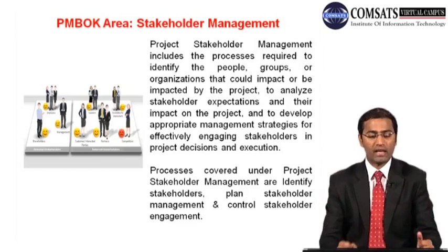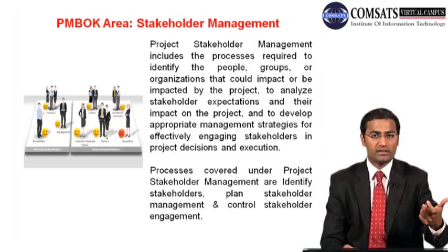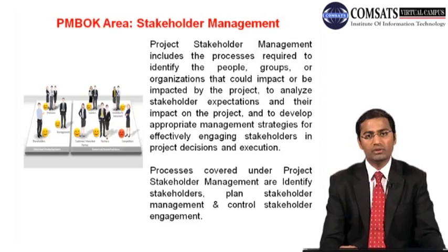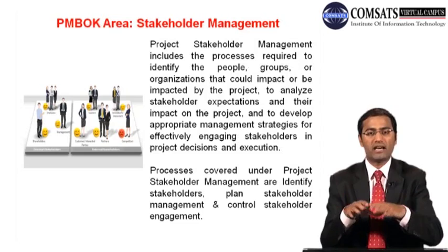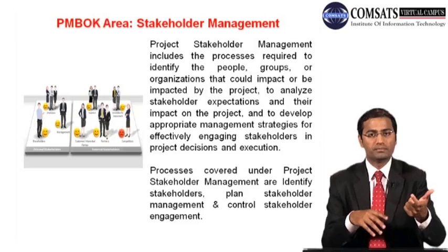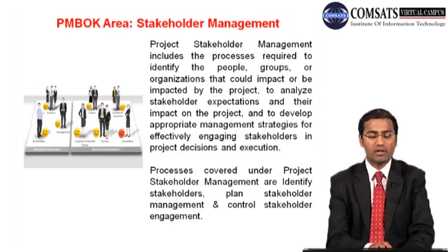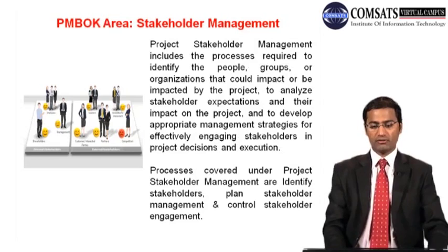And besides the number, there are other parameters like the interest of the stakeholders and the influence they can have on your project. If somebody has a great interest but cannot impart a very good influence, you can have a lesser stakeholder engagement strategy for this person. And on the other end, if someone has both good interest and good influence on your project, in that case you should be very careful, and you should devise a good strategy to manage the stakeholder. We will talk on that in relevant sections of our course.